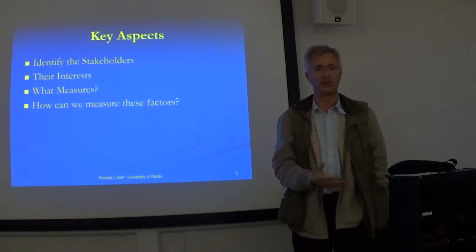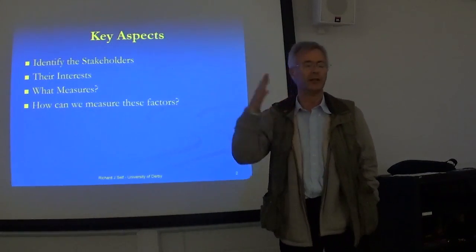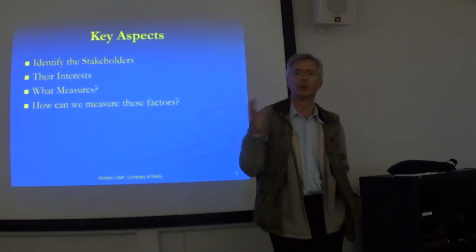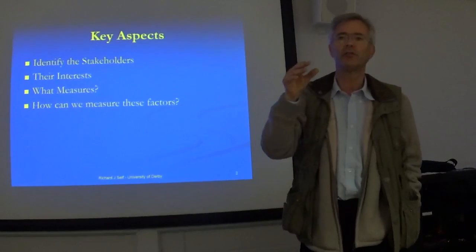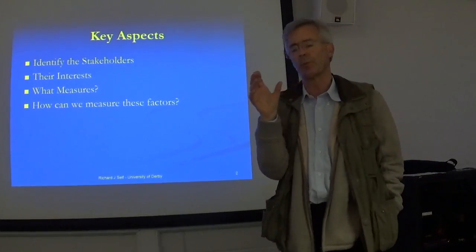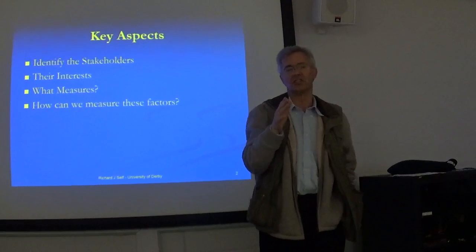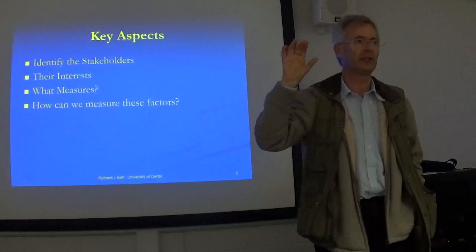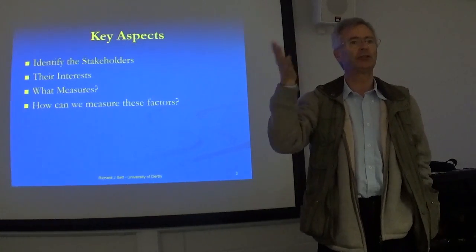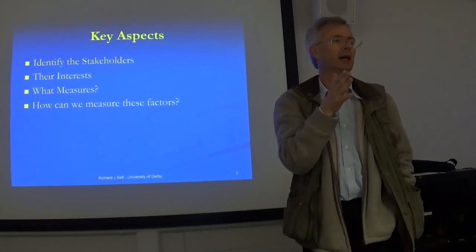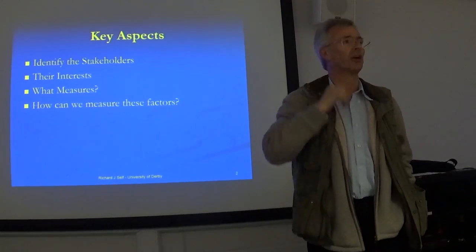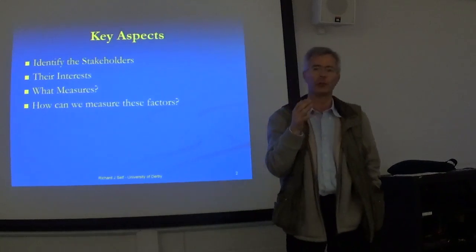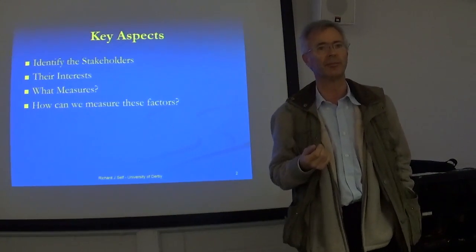And then it stopped again for 30 minutes. Then it came back to life for a few minutes, and so on. And eventually, it took about a week to discover what had happened. During the development of that particular implementation, for a variety of reasons, the search criteria in one particular transaction had been changed from one column, which was the standard column to search on, to another column. And it turned out that someone had forgotten to build an index on that new column.